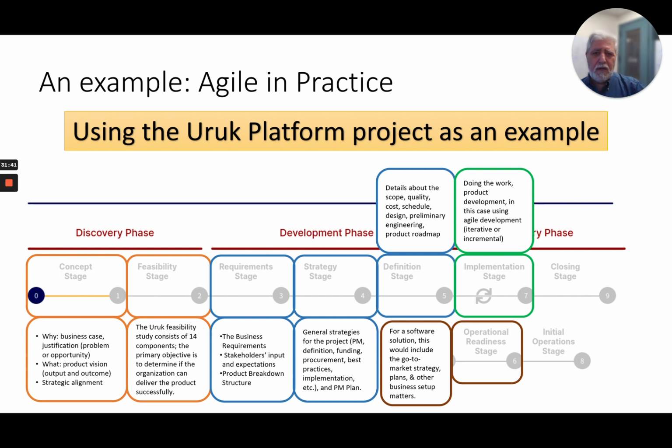So here, obviously the coders, the developers, the quality people are working on the implementation of the platform, while the business people are working on readiness. If we don't start doing this now at gate 5, what does it mean? We finish implementation, we have a product, but we have not done any marketing or preparation to sell it, or have no idea about the pricing model, which means the product could be ready to go, and we are still chaotically wasting 2, 3, 4 months, not knowing what to do or how to sell.